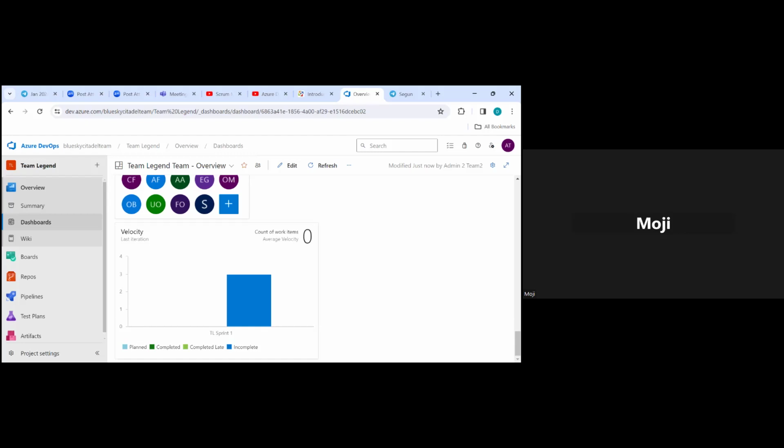So Scrum Masters, try your best. No matter how late you finish your sprint planning, ensure you commit and move all the stories that the team has committed to into the sprint that particular night before 12 midnight. At the place of work, you will definitely do it during the day, maybe because your sprint planning is at 9:45 or 10. So you will complete and set up everything during the day, and definitely it will show there. But just so you have that experience here, make sure you complete it before 12.